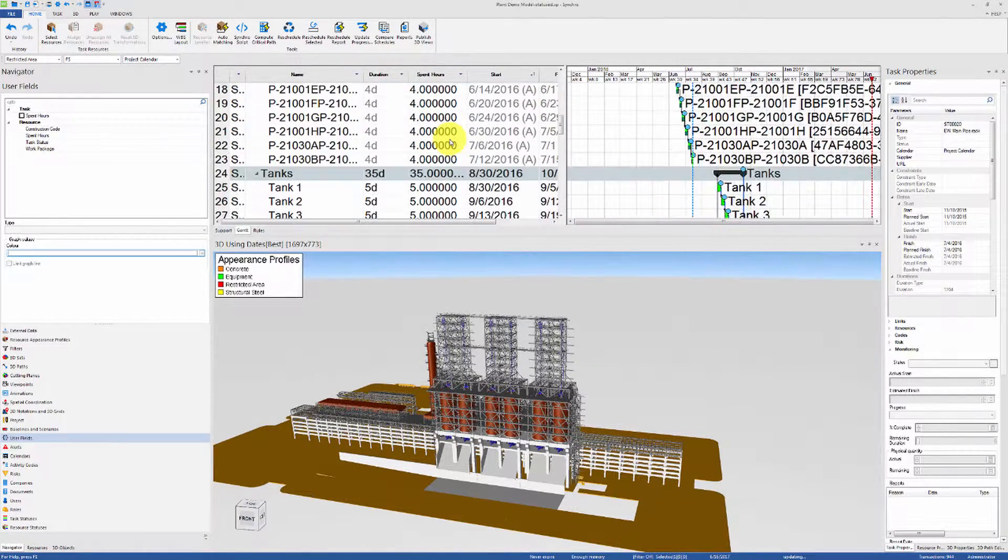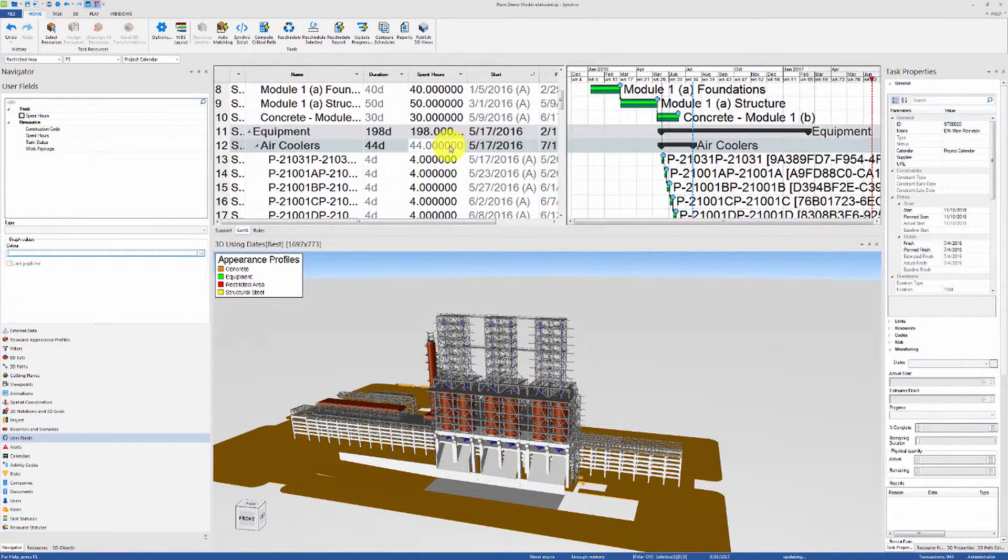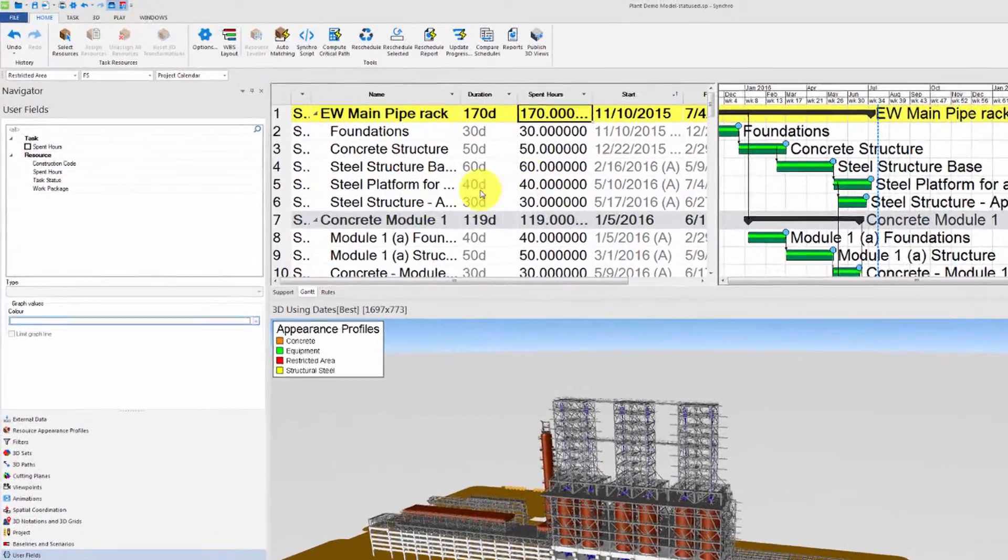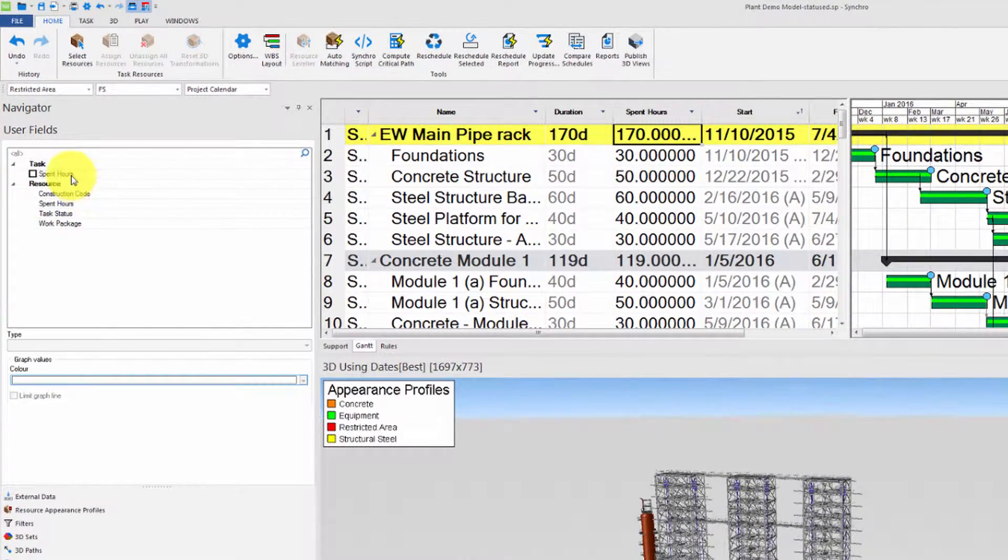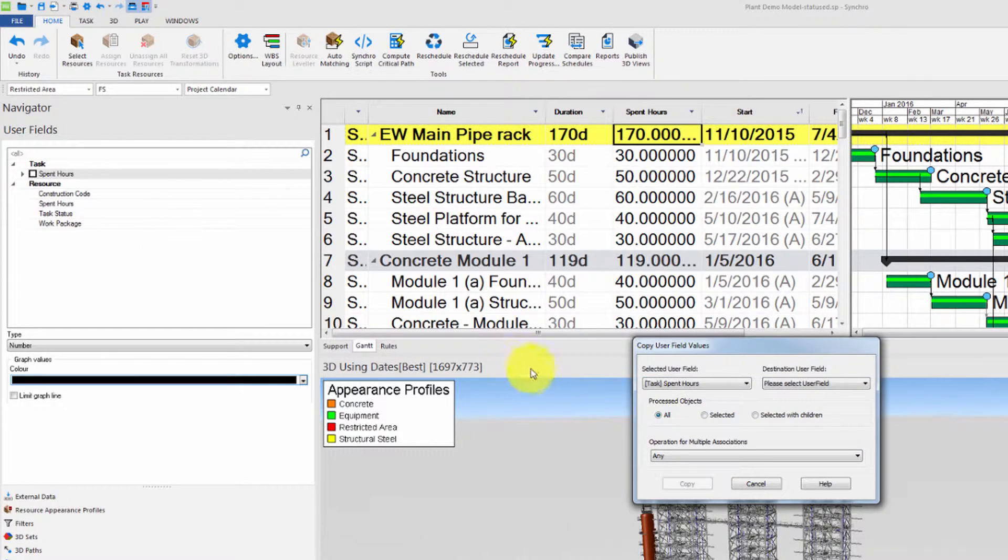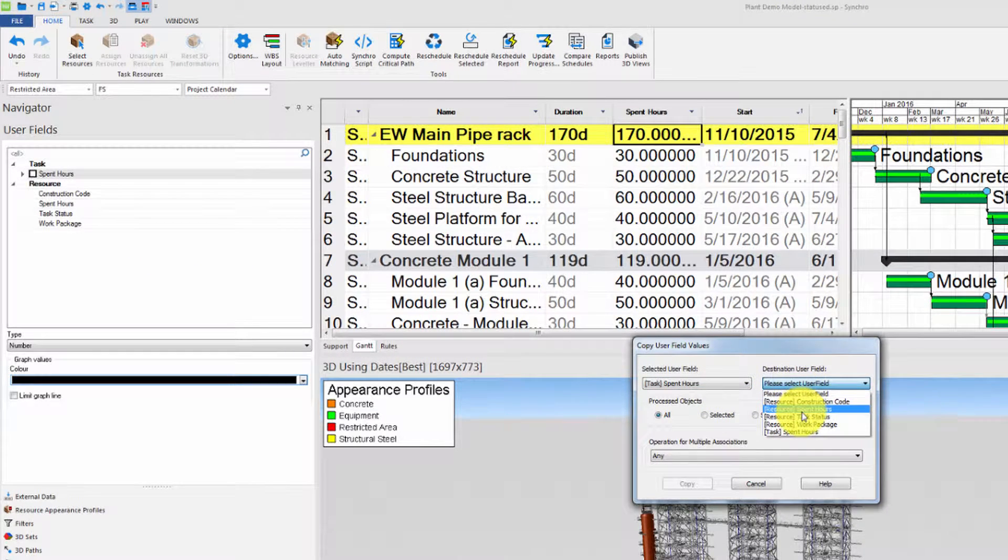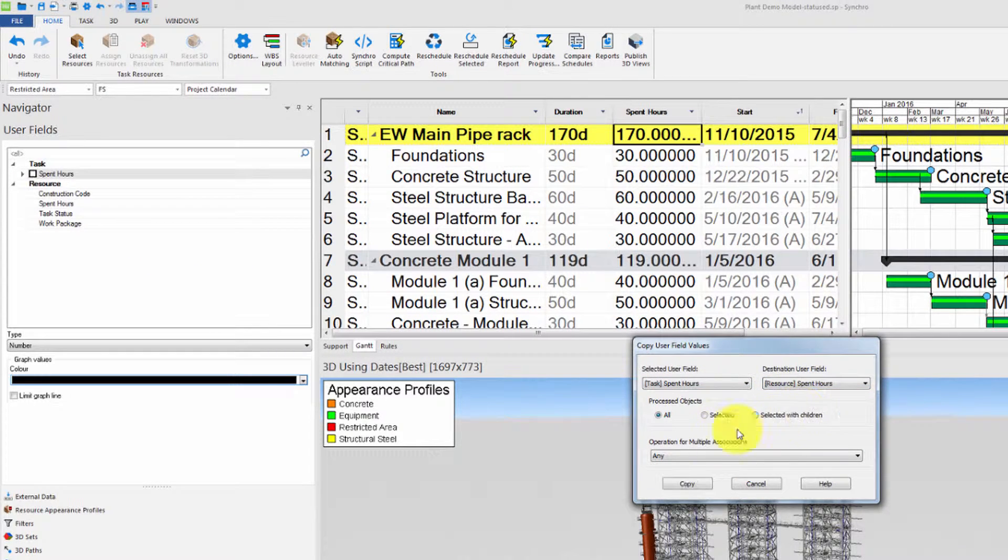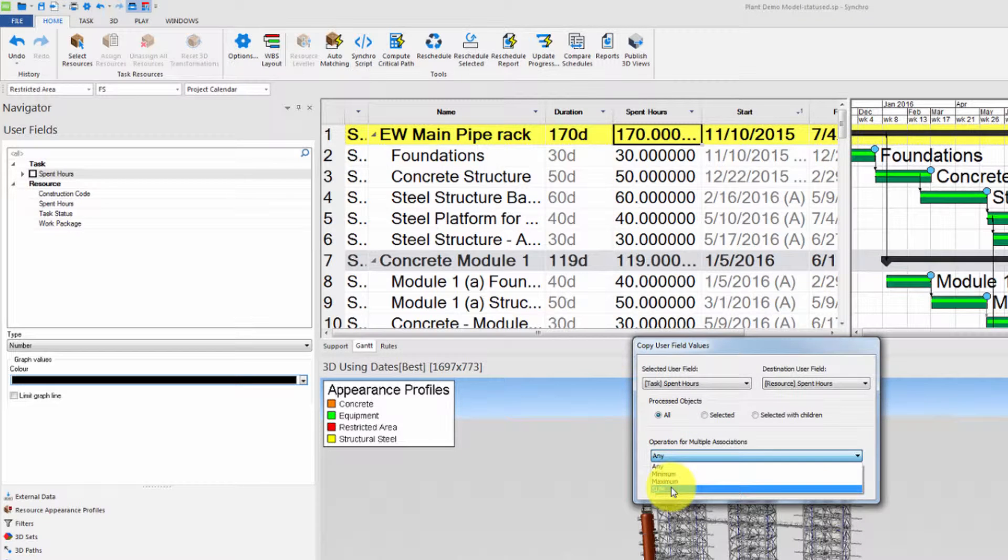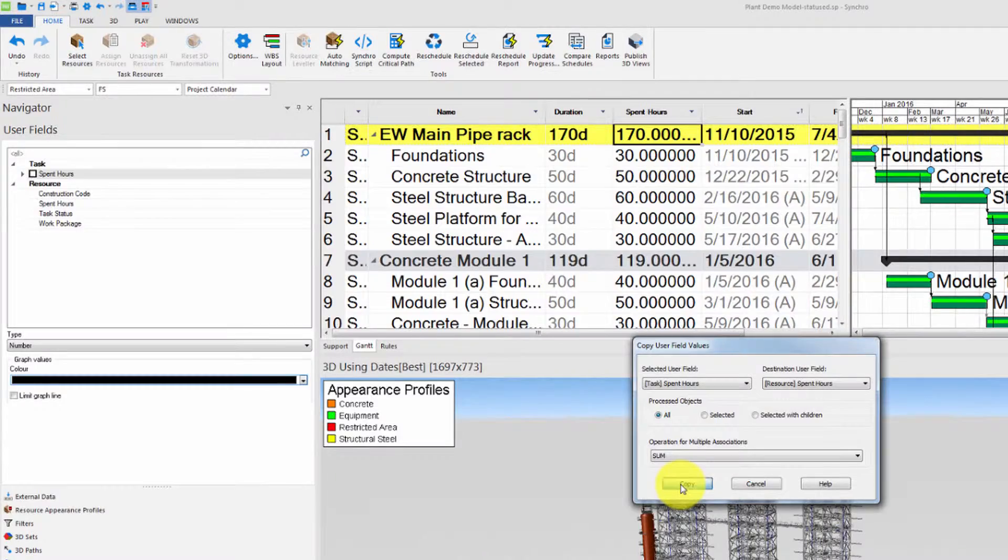Scroll through the Gantt chart to make sure everything is correct. Now we can right-click on the spent hours task user field and click on copy values to associated objects. Make sure that the destination user field is the resource user field spent hours and that the operation for multiple associations is set to sum. This will add up the spent hours when the same resource is associated to multiple tasks.